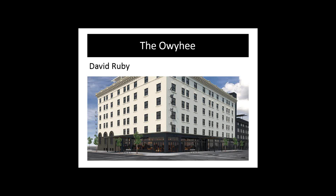We had lots of discussions about, as one example, lighting, which has been mentioned a lot. The first lighting package that came out for the building was a typical commercial light package. One of our goals, and this is kind of a fuzzy goal, was let's use all LED lighting. It's here, it's coming, it's basically getting affordable if it's not already. Unfortunately, by the time we really got numbers on that package, we had found $500,000 in asbestos removal that nobody knew was there, that didn't show up on any reports. We had huge chunks of the budget eaten away by plugging holes in the dam, so to speak. And so a lot of those things had to be VE'd, if you want to use the term, down to a lesser quality light fixture in that case, because there just wasn't enough money left.